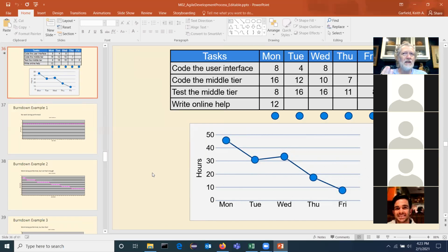And you're not really tracking items left to do. The thing that's important is to track hours left to work. And why is that? Because remember, one of the features of the Agile system was the time constraint is fixed. So in 2 weeks, whatever you got done is what you got done. And you can't say, hey, can we extend this sprint by 3 days so we can get something else done? No, it's time boxed. This is actually a great tool. It forces you to get your work done as efficiently as you can.